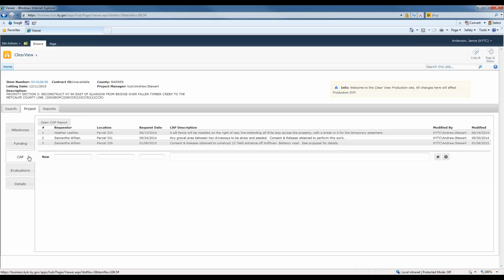Let's take a look at the cap. This project, you'll notice, has 3 caps. If you need to enter a new cap note, click down here on New. You will enter all the information: the requester, the location, the requested date using the calendar box, and a description. Once you save this, it's going to automatically put in your username and the date you entered the cap. I think I showed you how a cap report prints out, but I want to point out, here's the button if you need to print it.